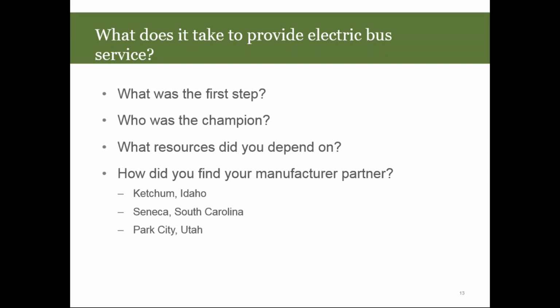We were able to find that Proterra was able to match what we needed at the time. So we said, okay, you say you can do it, but come up and prove it. And so we set up a demonstration where they came and went on our steepest hills, ran around on the route that we had established.